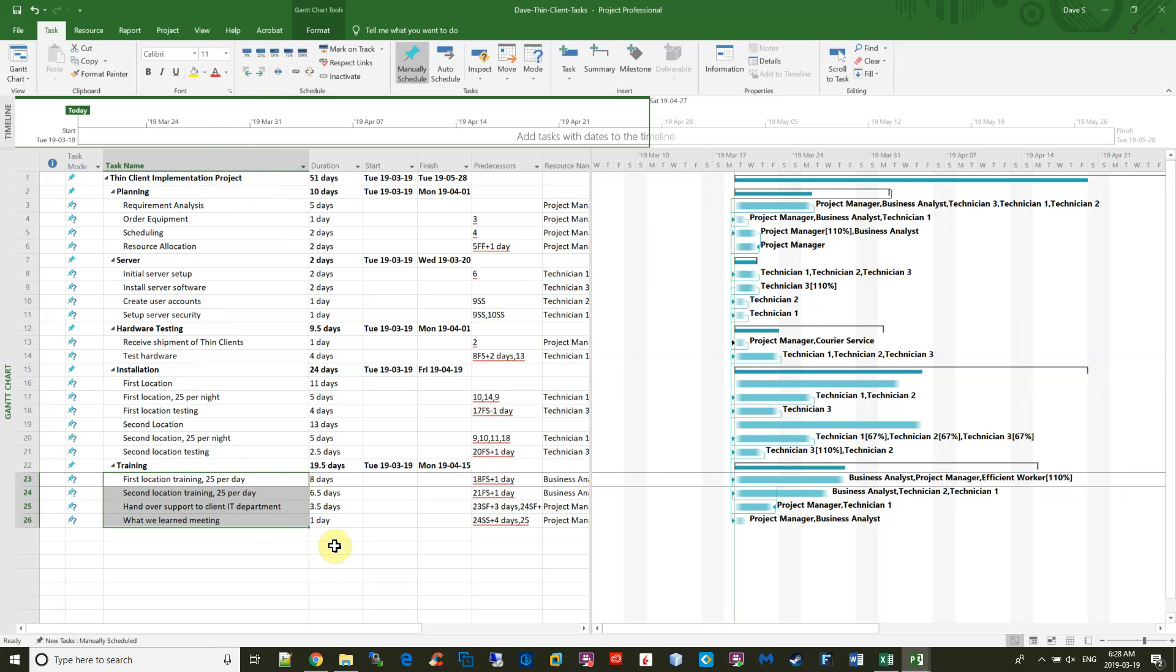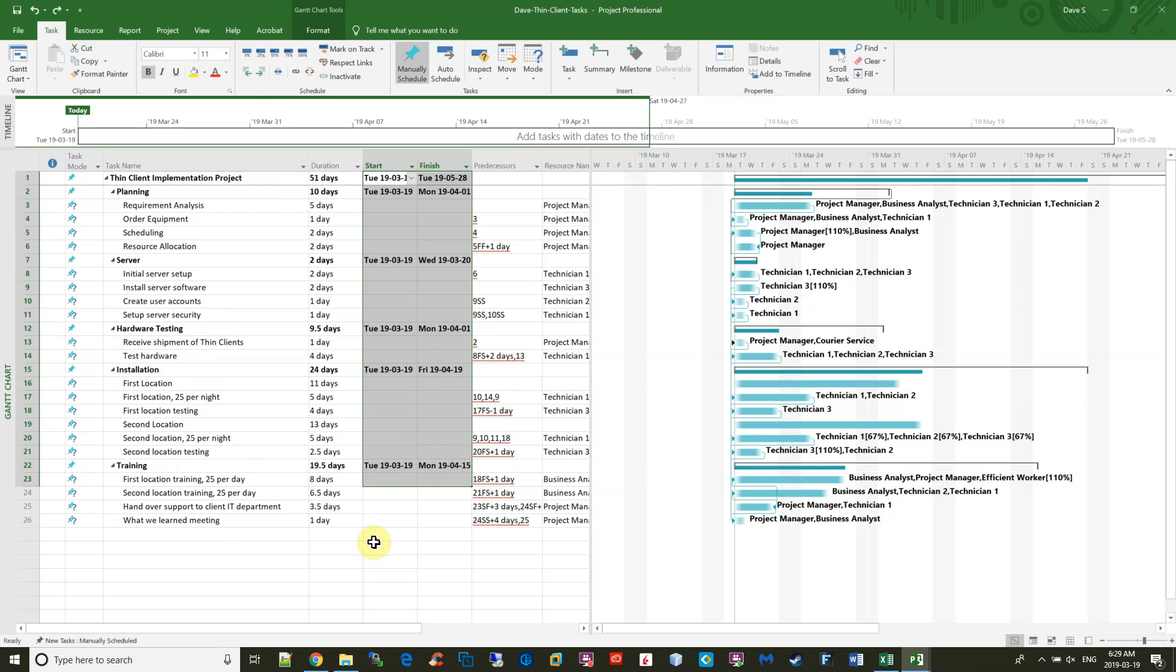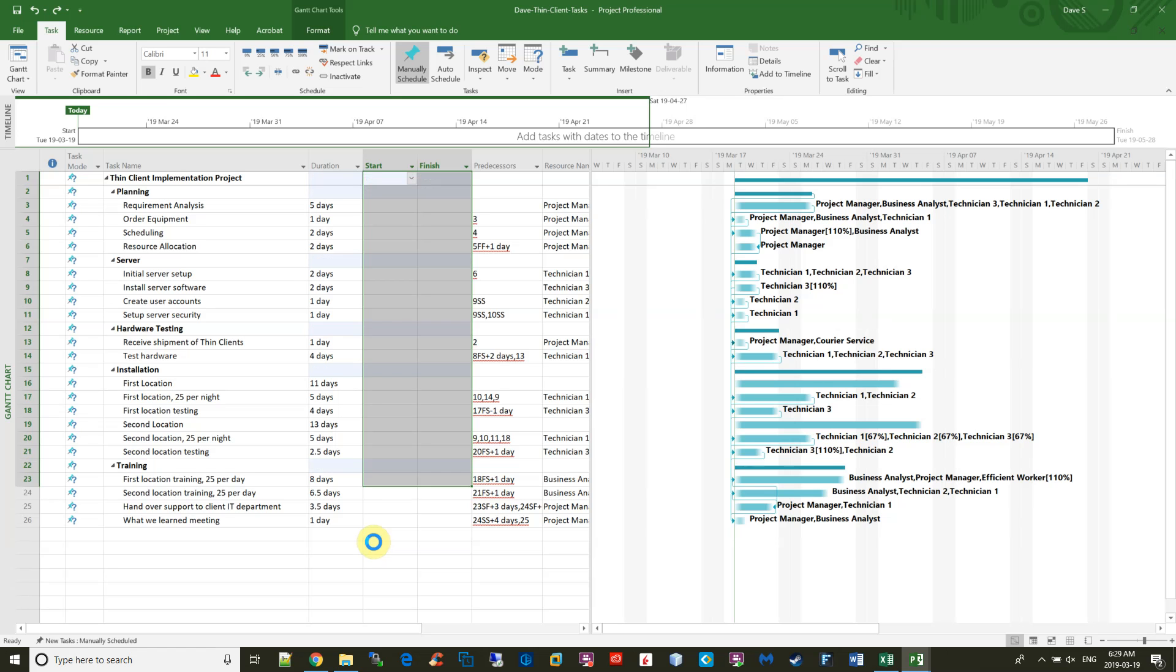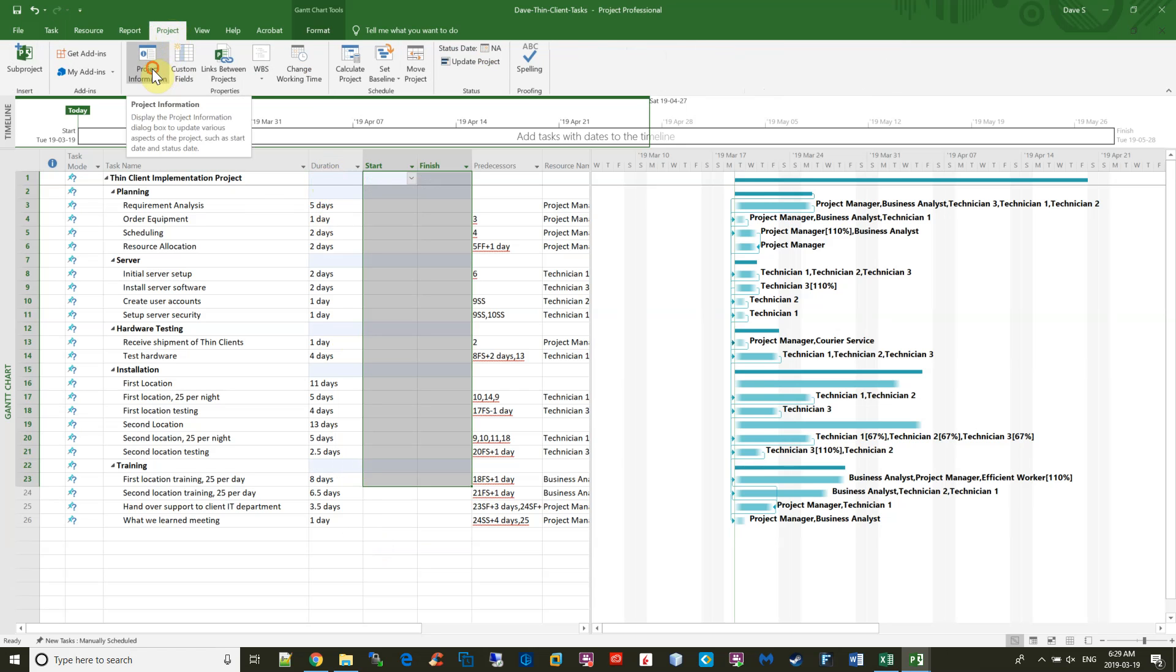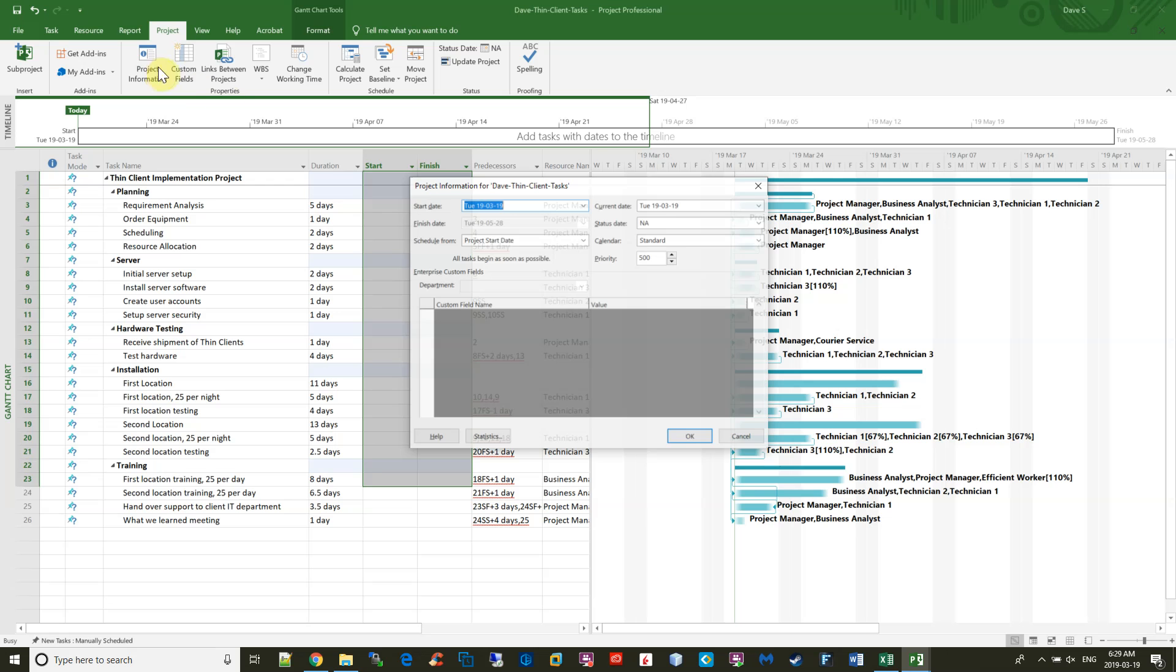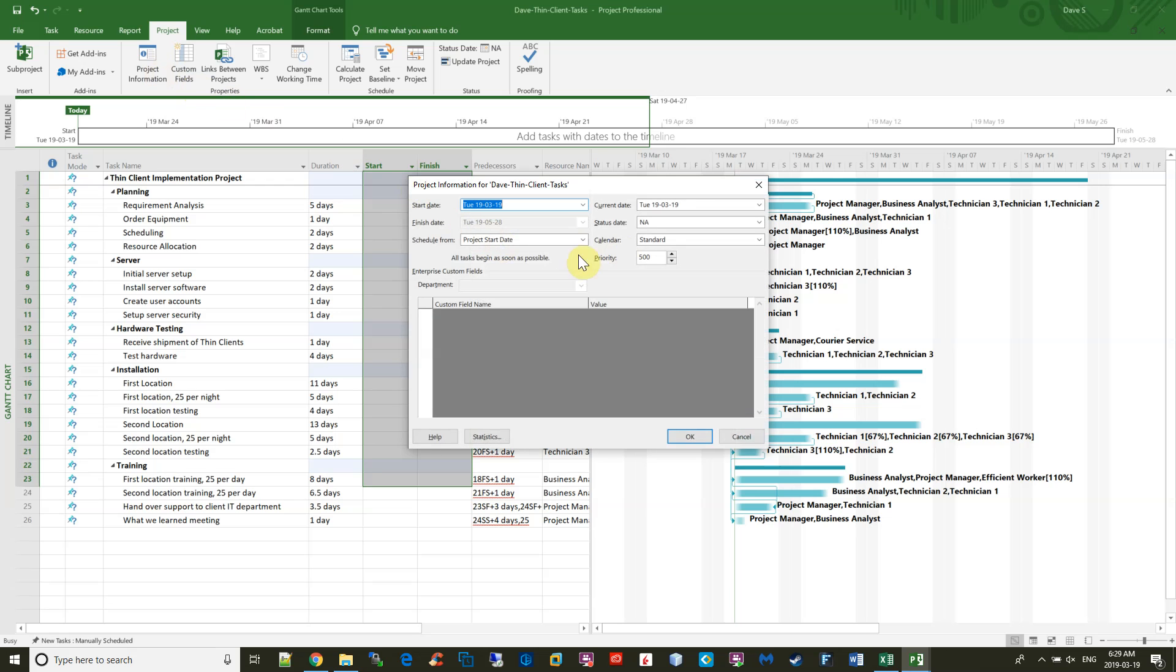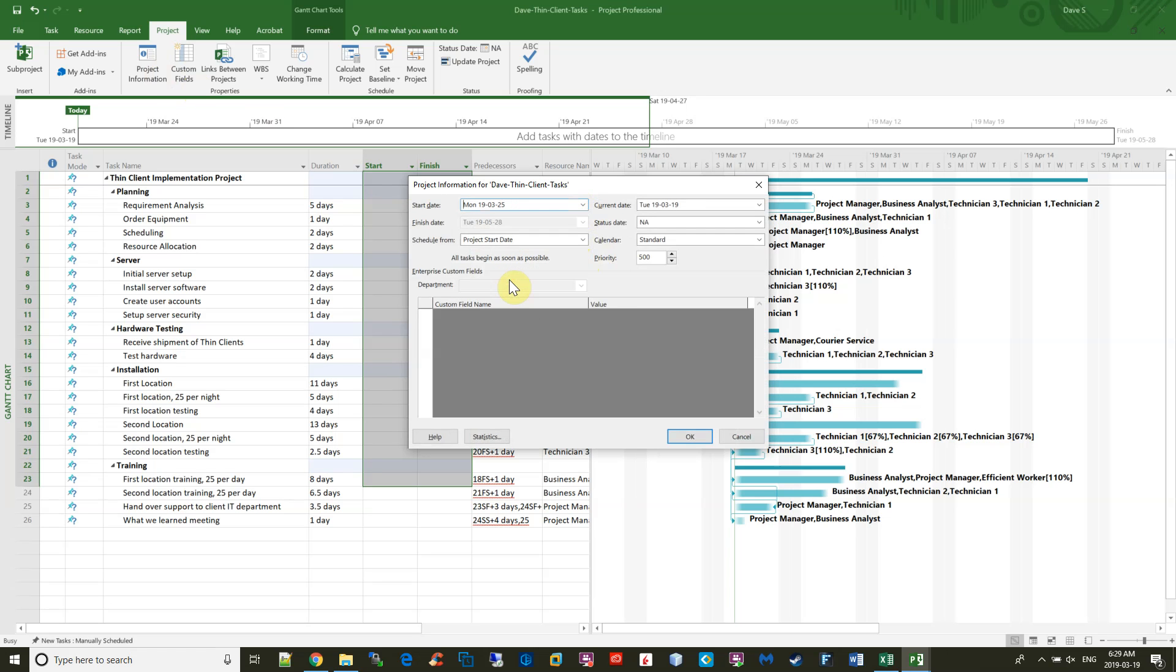Next, I'm going to deal with the dates. I'm going to delete these dates which just came in on their own. So I'm just going to highlight the dates and press Delete, and you'll notice under Duration Summary tab tasks they disappear as well. Then I'm going to go to the Project tab first and Project Information, and I'm going to set this start date to next Monday, so it'll be Monday the 25th of March.